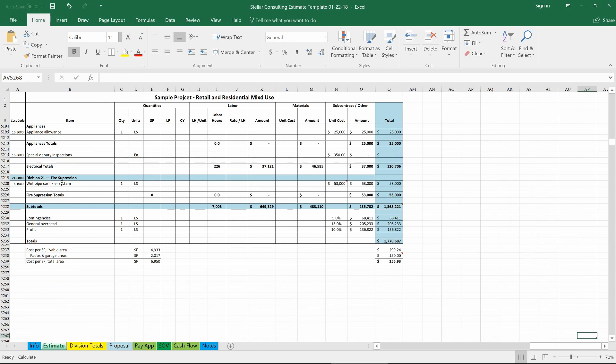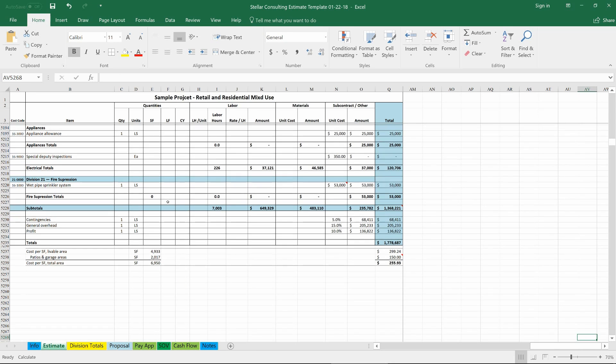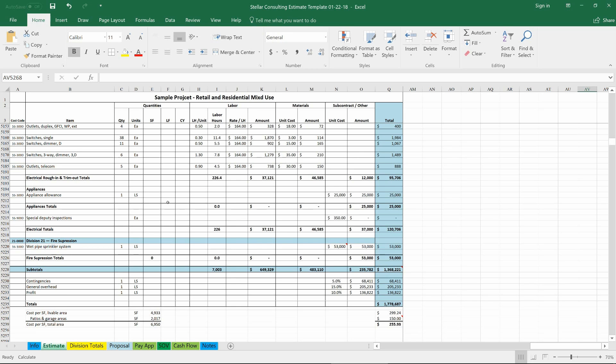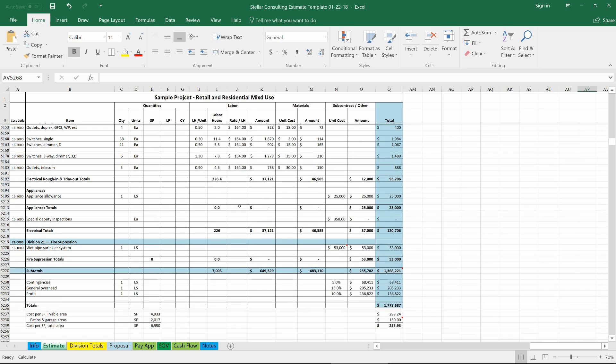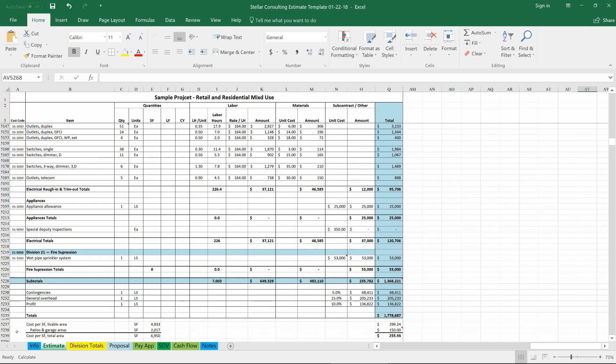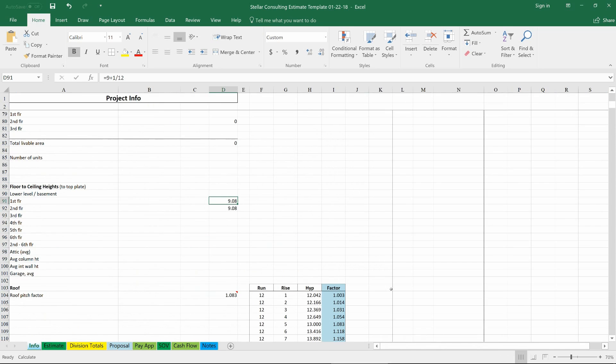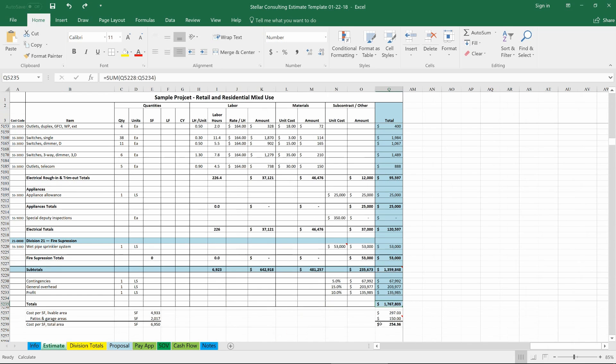Everything in the entire budget and the entire spreadsheet will have changed. Everything that's associated. So everything from two by fours and the insulation and gypsum and interior paint and sheathing on the outside and siding and exterior paint and downspouts and anything else that is related automatically is tied into those items, those cells on the info tab and therefore automatically change. So it's a great tool for value engineering being able to work through something like that and here we can take a look at what the total price is. I'll click undo and come back over and see our price adjusted accordingly.